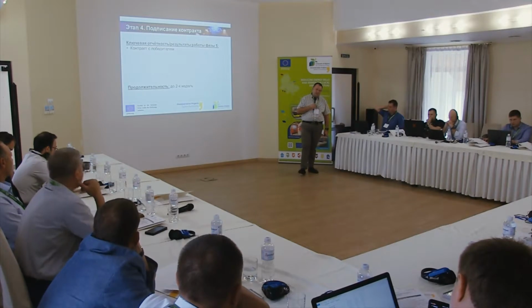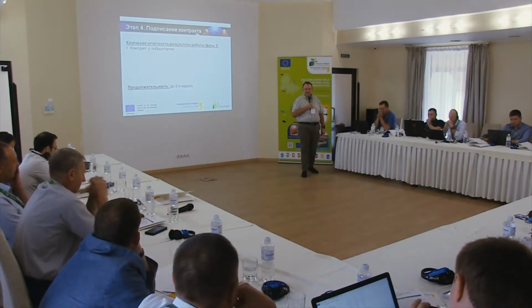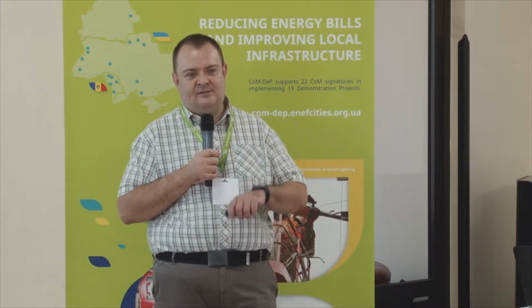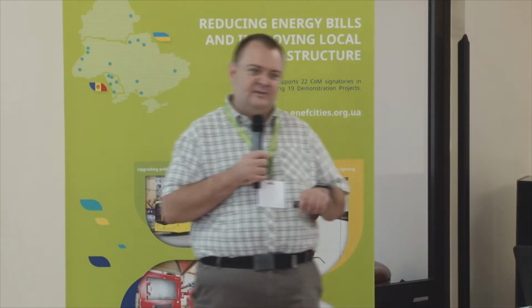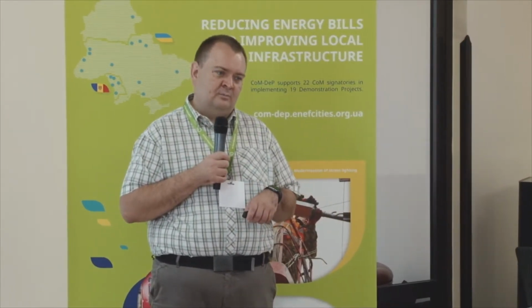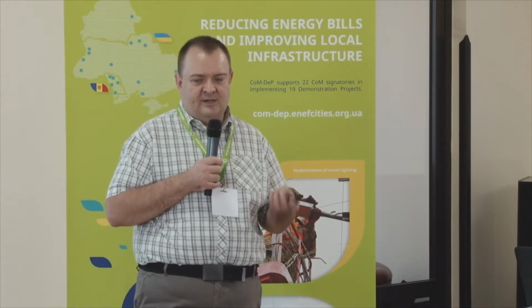What we are going to stress here is that the construction company will do only those things which are included in the contract. So you can require from your contractor only those things which are mentioned in the contract. Therefore, preparation or drafting of the contract, which in the majority of cases is part of the tender portfolio or dossier, means a lot when you build your relationship between you and the contractor.